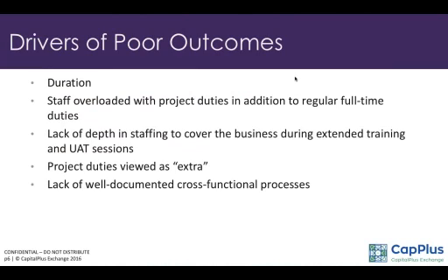In another case, we had an institution with well-documented procedures by functional area. They had it. But when trying to merge these procedures into one process workflow, gaps, contradictions and errors were noted. Remember, you need to implement a system with the workflow that you require. It should not be the vendor's workflow, it has to be your workflow.